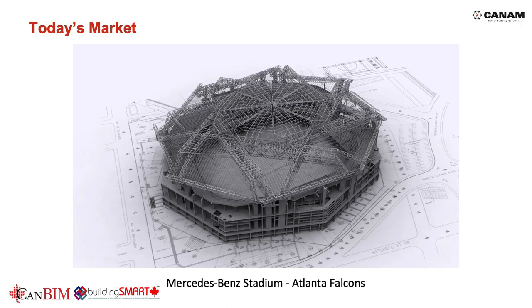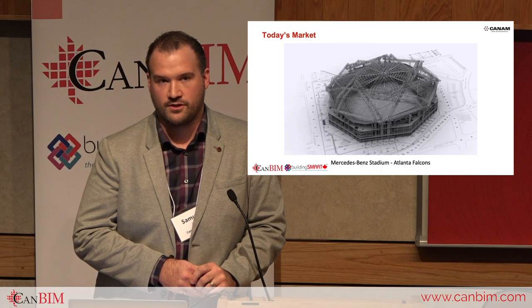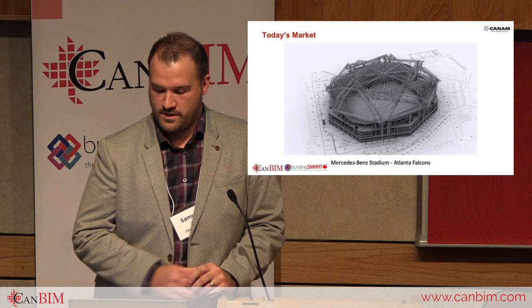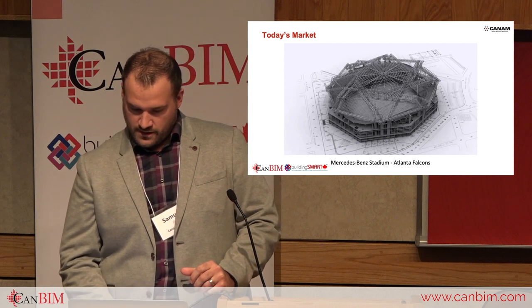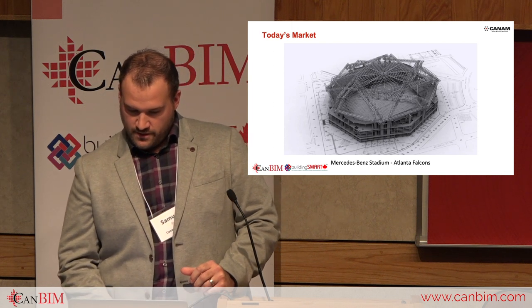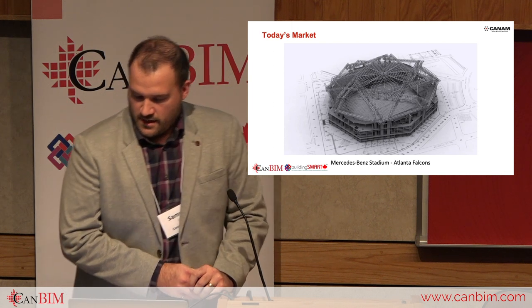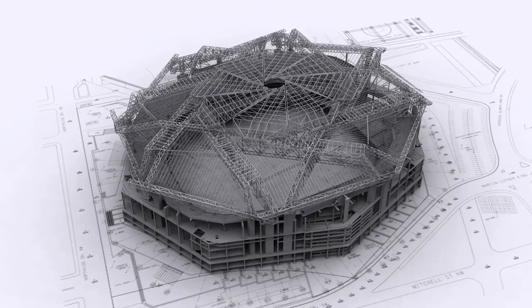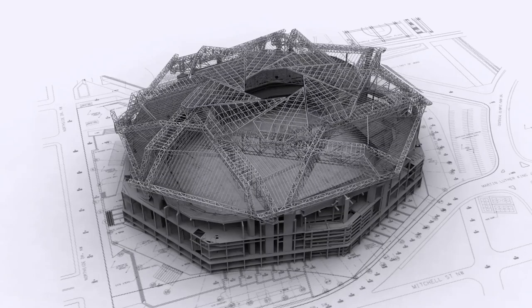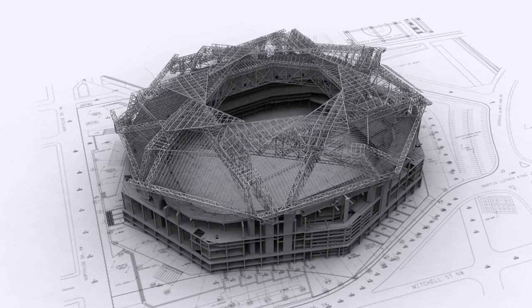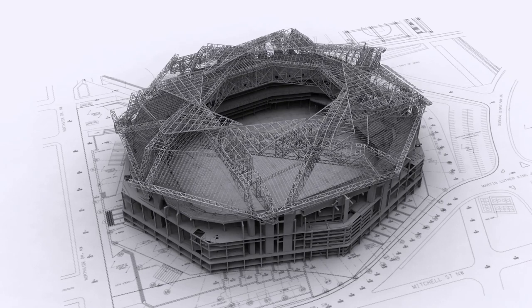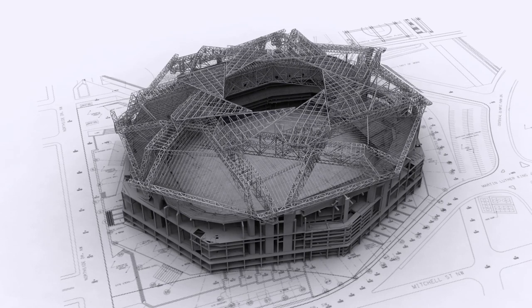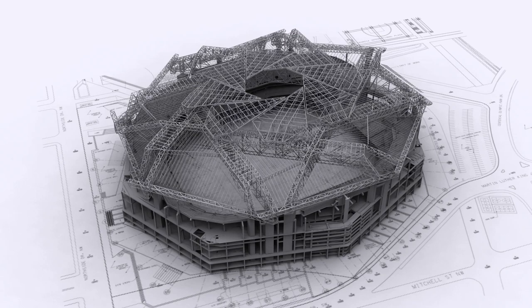Can-Am supplied and erected 29,000 tons of structural steel components. The retractable roof is unique, made of eight interlocking panels, forming more than 200 trusses that span over 735 feet across the length of the stadium.